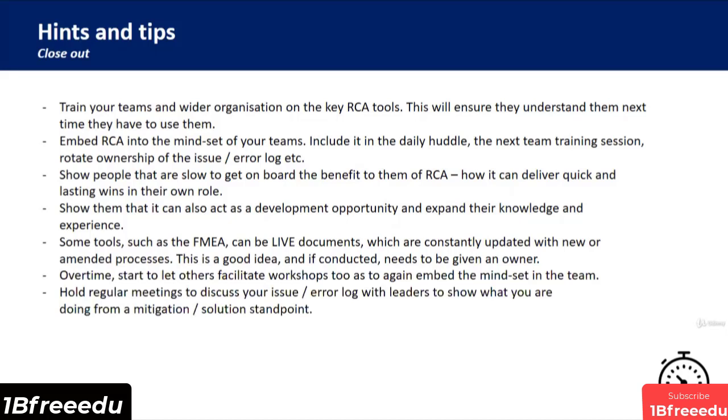Hold regular meetings to discuss your issue and error log with leaders to show what you are doing from a mitigation and solution standpoint. And again, this will show the benefit of RCA if you can show exactly what you're doing to mitigate any of these problems and issues going forward. Make sure that issue log is a live document that is being utilized effectively.